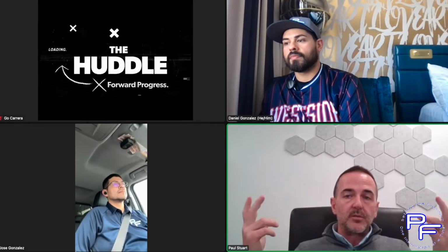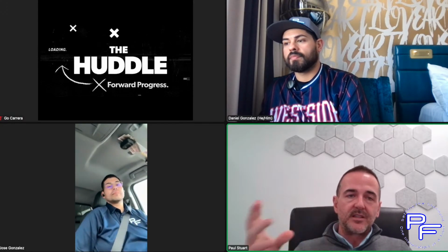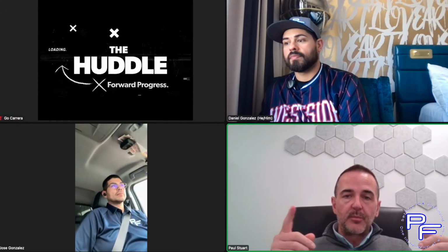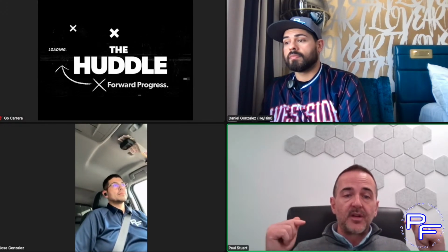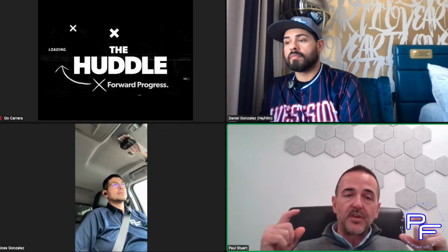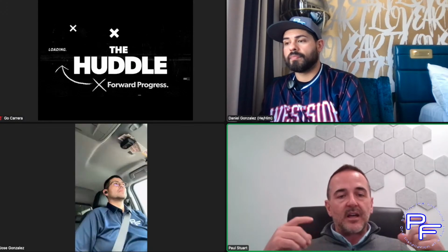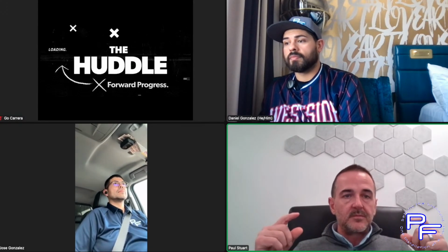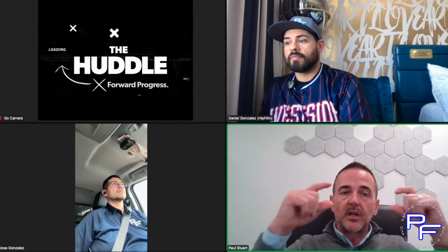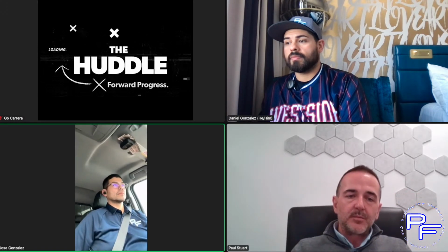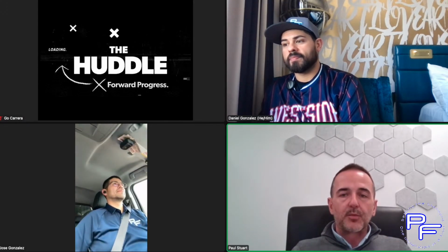Let's call it some moisture mitigation, but it's not in its own spec and it's only listed on a detail in the drawing. I won a $380,000 job in Ponca City over this. It was because I specifically stated that I have moisture mitigation figured underneath all flooring as stated on this sheet, detailed this. And the value of that was $120,000. I had it in my bid, but I also told them the value of that and that it was included in my overall number. That made them make phone calls, and no one else included it, right? Correct. So it went back out for rebid, and I ended up winning that job.